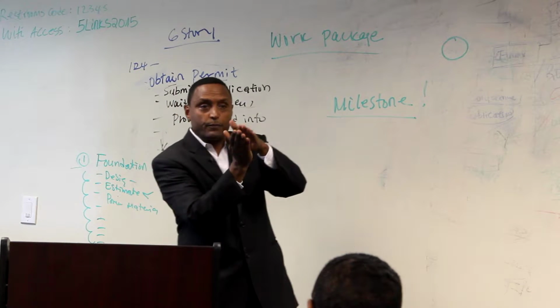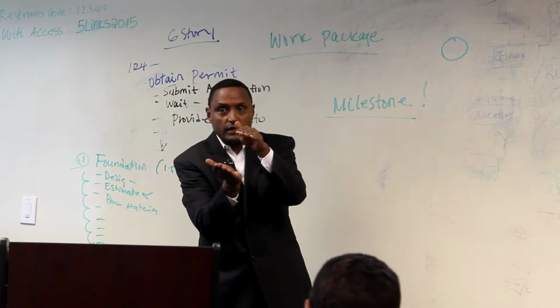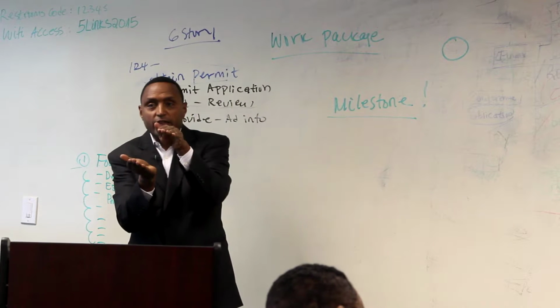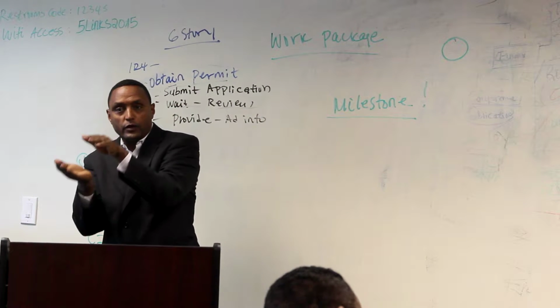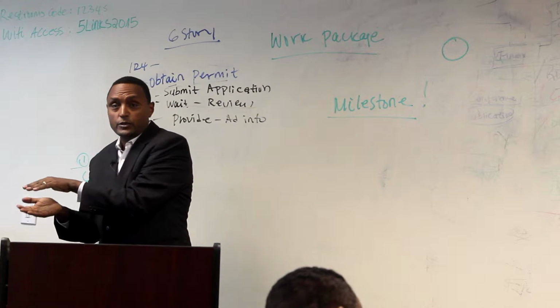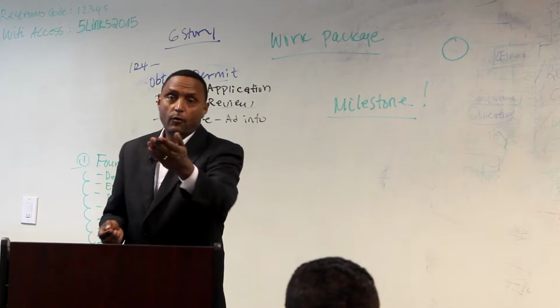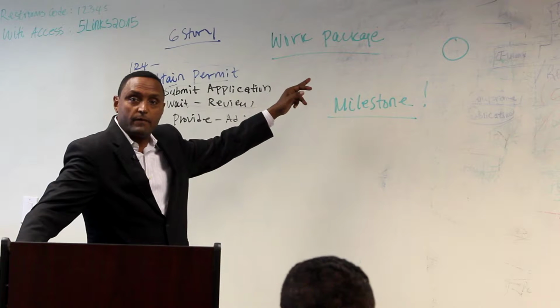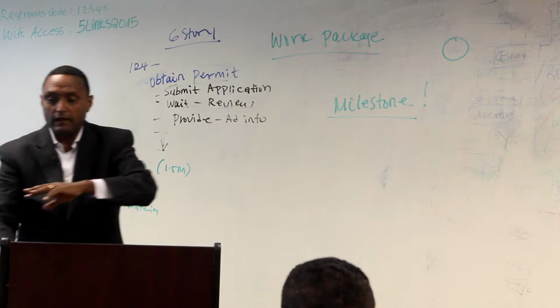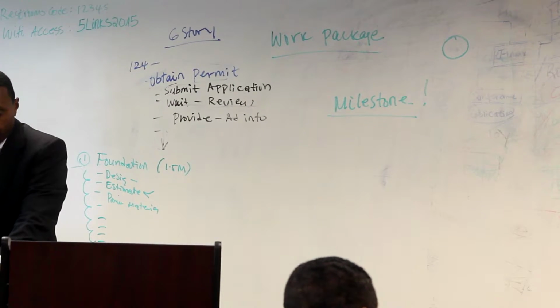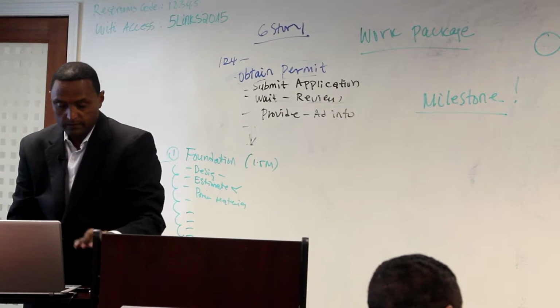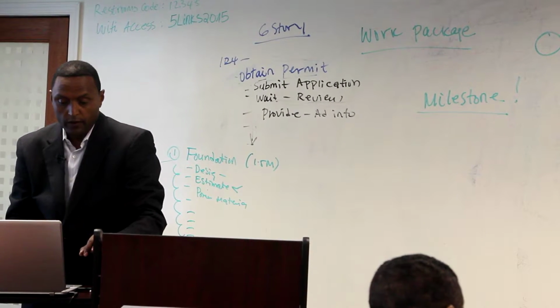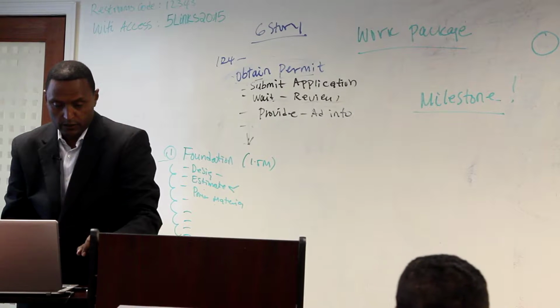So that's why you need to break it down into manageable chunks. Then you identify their need, you identify their time, duration, it goes all the way down. So in that case, if someone asks you how much your project costs, it's easy for you: you just sum up everything. We're going to get into that when we discuss time and estimation.